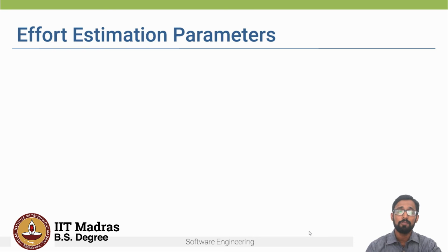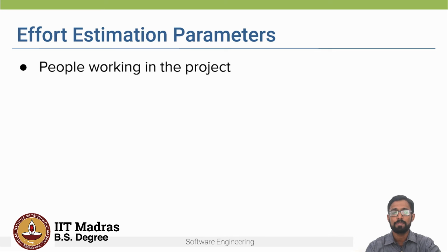Okay, so apart from the size of the project, what other factors have to be considered? Let's look at that. Some of you might have said the people working on the project, right? Some team members may be experienced, but not in the programming framework required for this project. Others may not have domain experience. So in the case of the Amazon seller portal, how an e-commerce application works, and hence some time will go into learning about the domain.